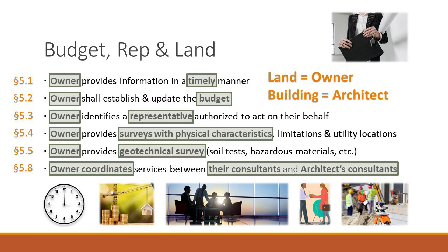But we have our project manager out in the field, and he's the day-to-day person, but he doesn't have the authority to sign a change order or otherwise. He has certain other authorities. And so he's not necessarily identified in the contract as the contractual authorized representative. So this is something that 5.3 requires. There was, in 4.3, I think, or 3.3, but 3.2 maybe, the architect had to provide an authorized representative. So it's the same on either side.